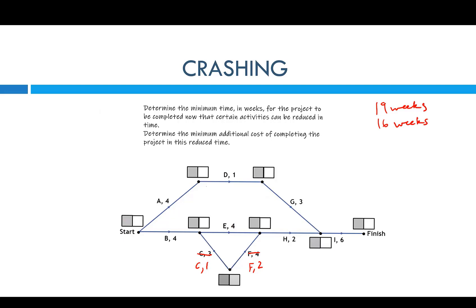E is also on the reduction list — we can reduce E by two weeks. But let's just reduce it by one week for now. So E becomes three. When we do that, we get a new critical path. Starting at zero: to four, to five, four over here. Four plus one gives five. Five plus two gives seven, and four plus three also gives seven — so it doesn't matter which way you take, that's seven. Seven plus two is nine, and nine plus six gives fifteen. So it has reduced the time.